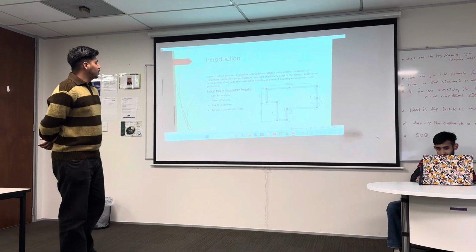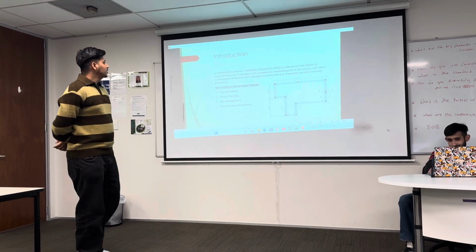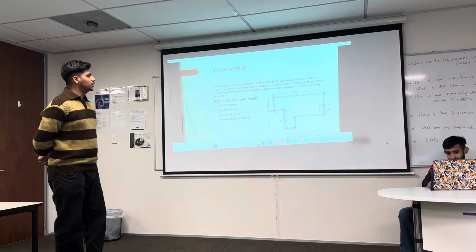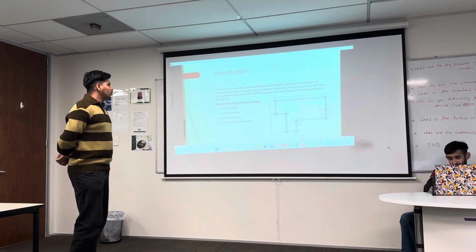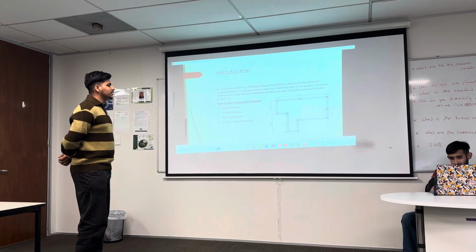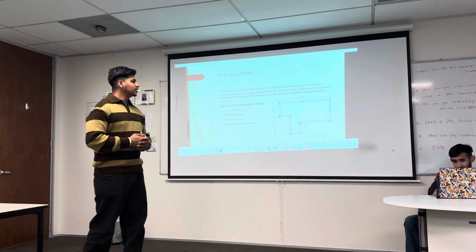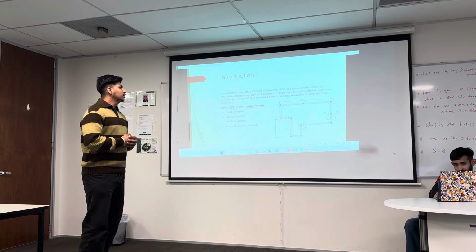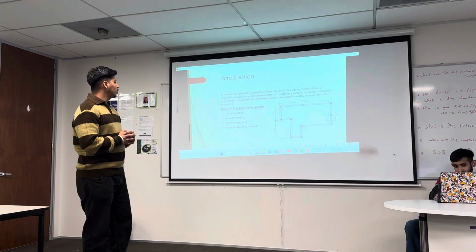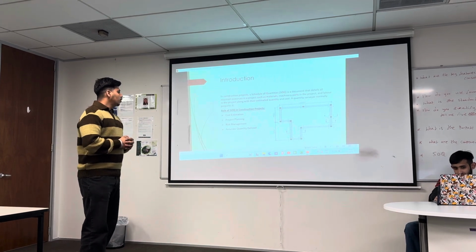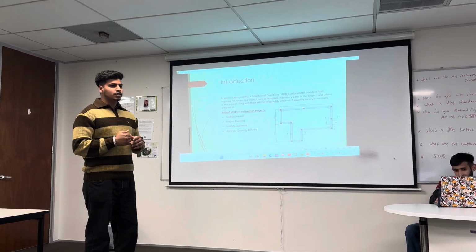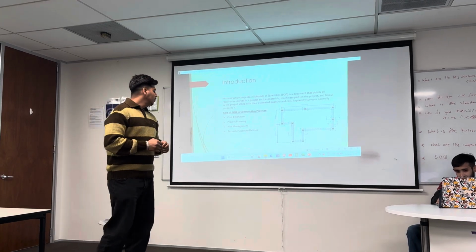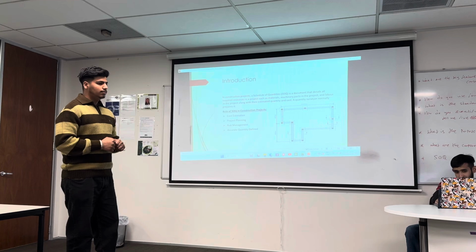Now we will discuss the introduction of this presentation. In construction project, a schedule of quantities SOQ is a document that details all the required resources in a project, such as material, machinery, parts in the project, and labor in the project, along with their estimated quantity and cost. Quantity surveyor normally prepare it. The role of SOQ in construction is, first, cost estimation; second, project planning; third, risk management; fourth one, accurate quantity definition.